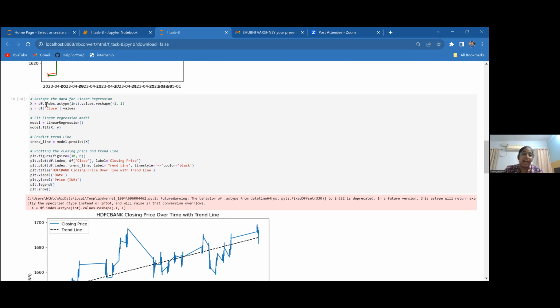The second step is to identify and resolve the risk. The third phase is to develop the next version of the product. And the fourth and last is to review and plan for the next phase. After that we start again from the first phase and continuously refine the process.